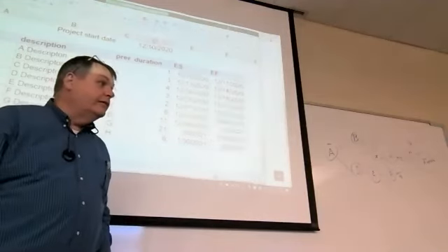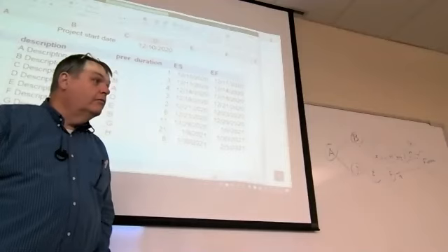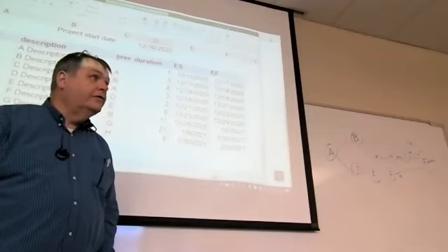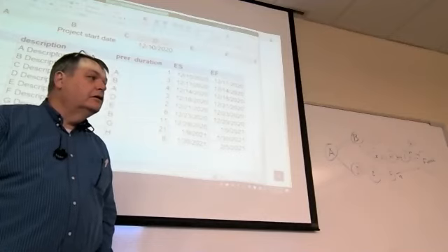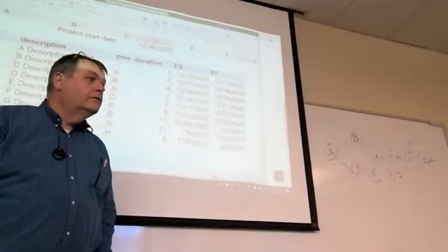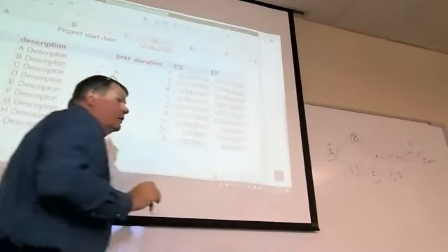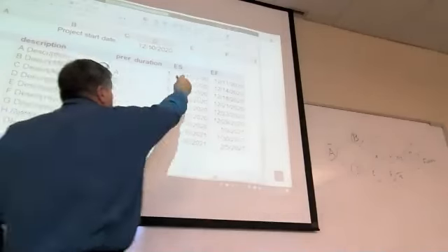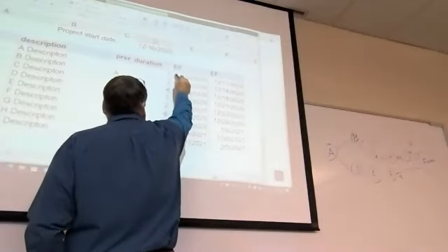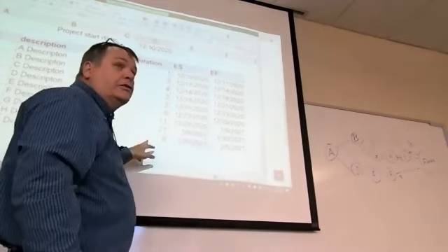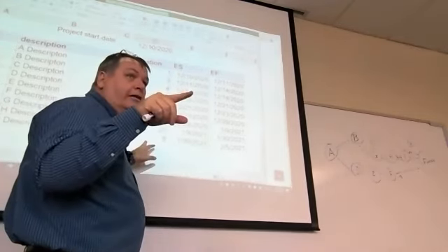Okay, make it dynamic. So you don't want to put the prereqs in the dates first. In that chart, you don't want us to do the estimated start just off of the durations. That's not an estimated start, that's early start. Early finish. Yeah, so this is the one that comes from up there, the start of the project, but the duration is here. And so you have to convert duration from this 1D to a number.